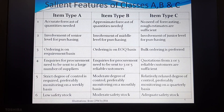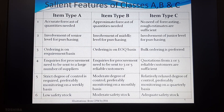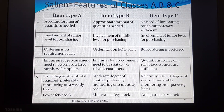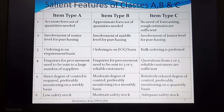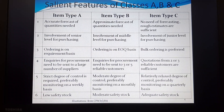For Class B items, only an approximate forecast is needed, compared to the accurate forecast required for Class A. Involvement of a middle level purchasing committee is acceptable. Ordering is done on an EOQ basis. Procurement enquiries are sent to about three to five reliable suppliers. The degree of control is on a monthly basis — a moderate degree of control is sufficient.